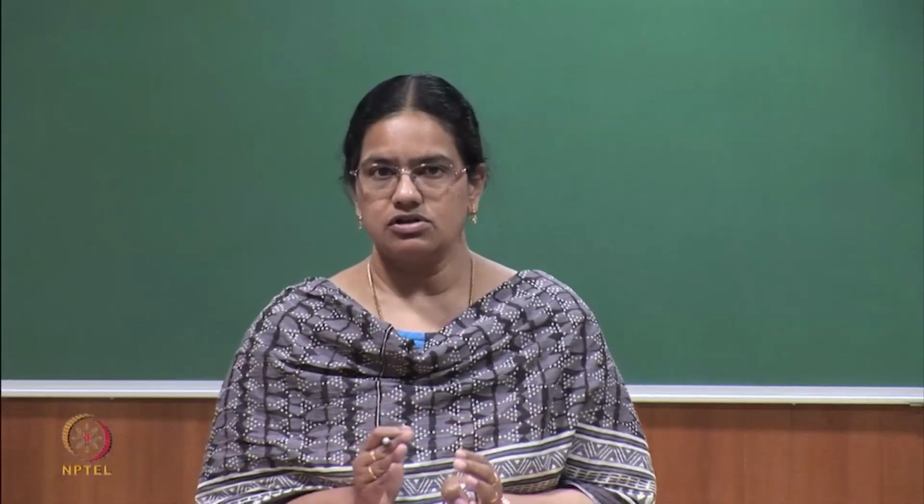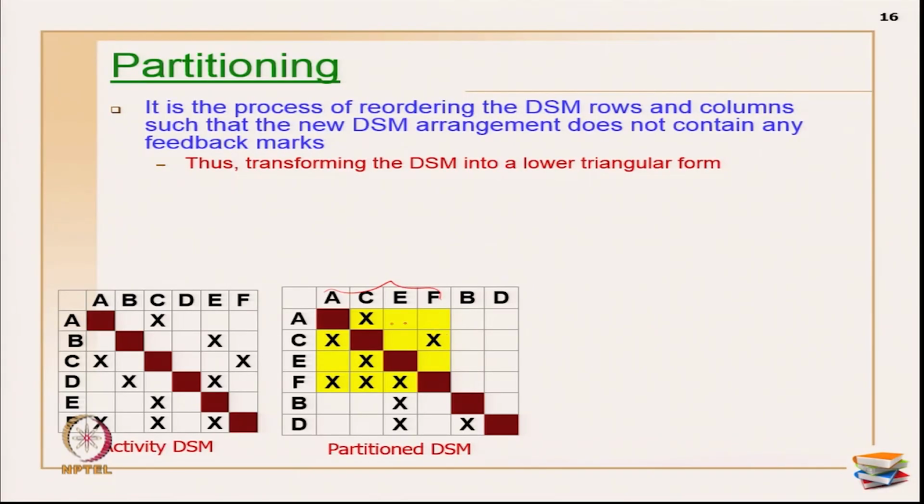Partitioning never talks about relationships within the block, and it also never talks about the sequence within the block. Okay. This A, C, E, F. So, I have shown here that partitioning will not talk about this sequence. So, you have to go through the next step in really identifying what the sequence there is. Okay. So, let us now see the definition of partitioning.